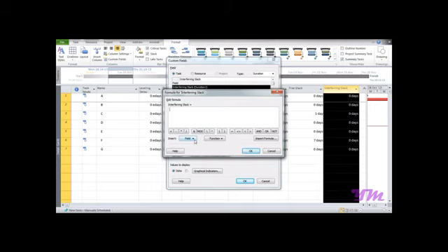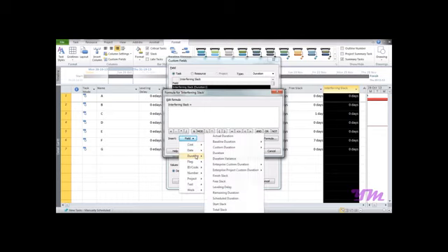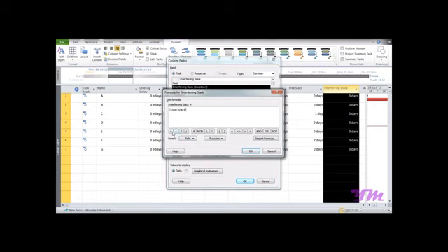Now we need to select the field. So our field is under duration, in which we have total slack. As we discussed earlier, it is displayed in days, so it's a part of duration. So we go over to duration and we can find total slack. Select the type of mathematical operator you want. As per the formula of interfering slack, it's total slack minus free slack. So I would again go to field duration, free slack, and press OK.